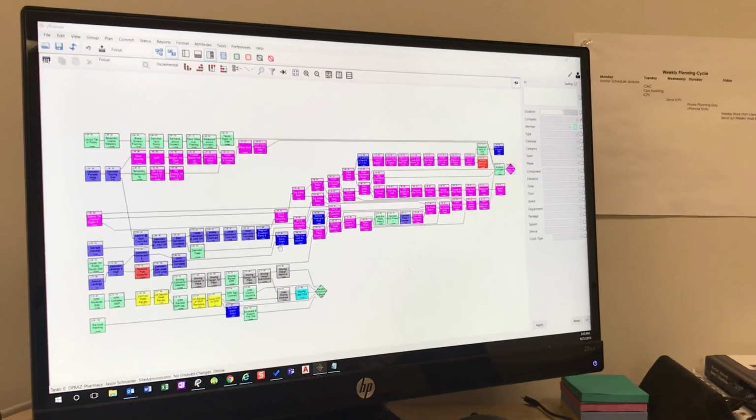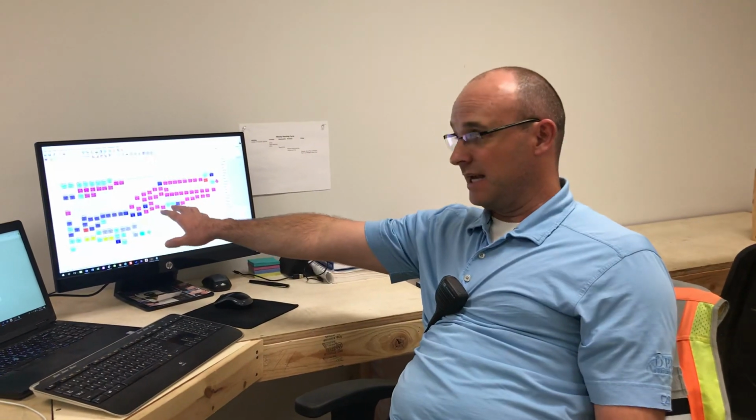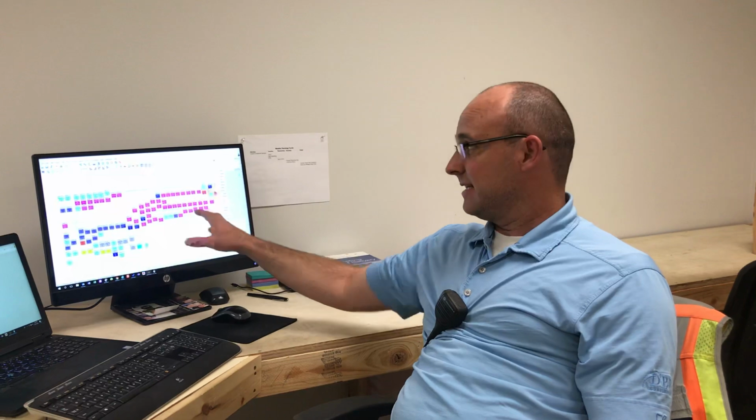I've just kind of given you, go ahead and zoom out so you can see my face. Anyway, super powerful. So like Smartsheet and BIM 360 Plan, actually let's just go to BIM 360 Plan. If you want trade partners entering their own activities and you have smaller portions of work, BIM 360 Plan is fantastic. That's probably your preferred choice. If you have like an MRI move, something super complex, if you have like switchovers for electrical gear, anything that has a lot of interdependencies and you need to do it quickly, vPlanner is probably your bet.